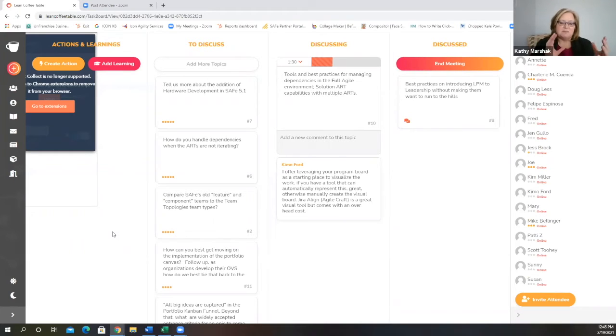And then the other thing, of course, at PI planning, on your program board and on your solution board, make sure you have swim lanes for the other trains, as well as other off-train groups such as shared services. That way you'll see those dependencies. And if you run your Scrum of Scrums or your Scrum of Trains in front of your program board or your solution board accordingly, then again, you're seeing those dependencies and you can more effectively manage them.